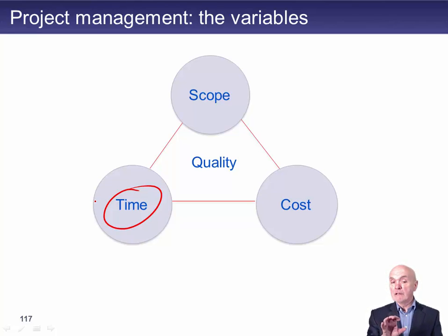But you might have to go and say, right, we have to get the time, and maybe then you have to go to the project sponsors, go to the people affected and say, look, will you pay more, or would you rather have the scope limited a little bit? How are we going to make sure we get the cost to where it should be, given the time deadline met? In other projects, it might be the cost.